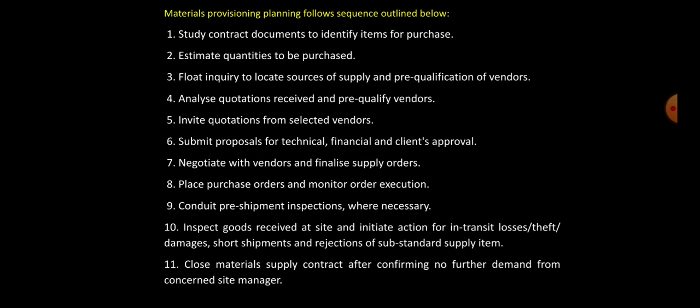and submitting it to the client, and pre-qualifying vendors is the next step, which is followed by inviting quotations from shortlisted vendors. After which, submitting proposals for technical and financial approvals from the client is done, which is followed by negotiations with the vendors in order to get a desired rate, after which we have to finalize the supply order.